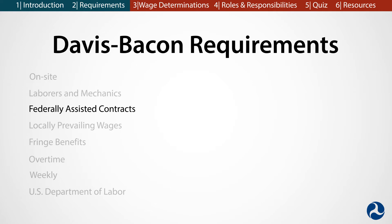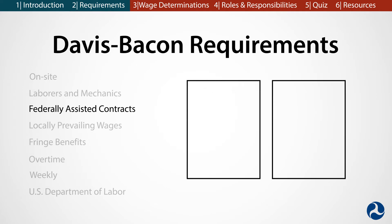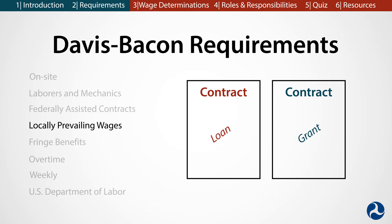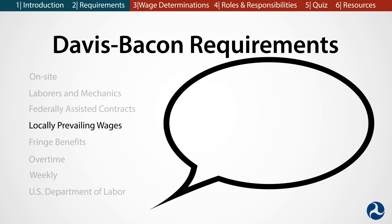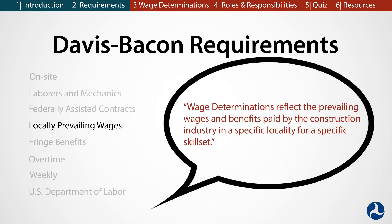Federally assisted contracts. Any construction project that receives federal assistance falls under the authority of the DBA. That means if a project receives a federal grant or loan, it must comply with the requirements of the Davis-Bacon Act. Locally prevailing wages. Wage determinations reflect the prevailing wages and benefits paid by the construction industry in a specific locality for a specific skill set.